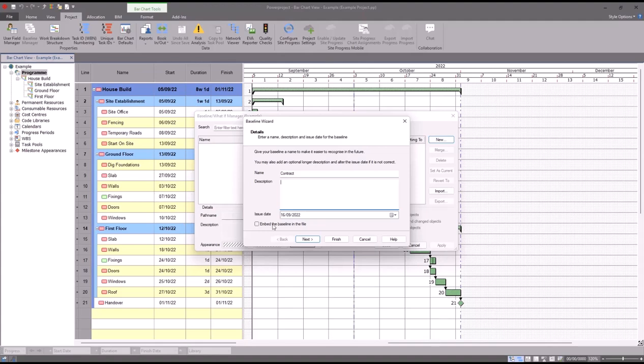If I embed the baseline, that four megabyte file will become an eight megabyte file because it is literally taking a snapshot of my live project and stuffing it into the exact same file. Now for a smaller project that's on my C drive, that's not really so much of a problem.